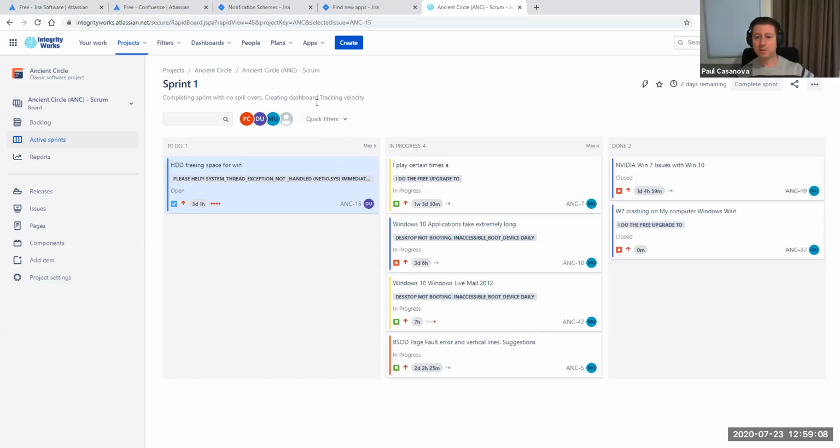Okay, so Ancient Circle, and it was these 3 dots here, right? And I'll just refresh. Yes. So I was referring to those. Yep. Okay, so these are just used as a visual indicator for how long work has been left in a column. One of the concepts with Kanban is looking for bottlenecks in your work. And so if something's sitting in a column for a long time, like 20 days, that's why this is shaded in red, then you know you've got a problem.